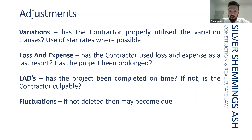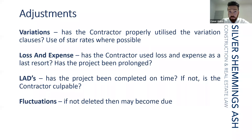Variations will also include adds and omits. If you're on a lump sum contract, which most are these days, all of your adds and omits will be included within the variation clauses as well, tracking the drawing changes between your contract drawings and your construction issue drawings.